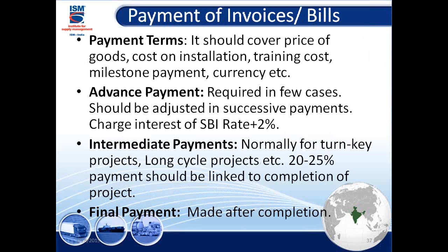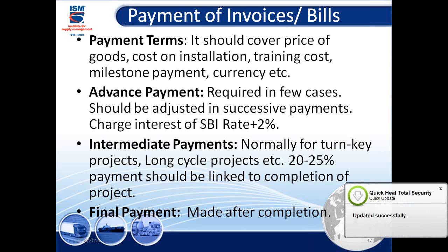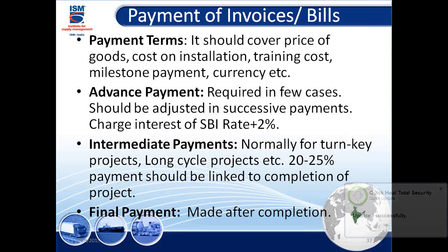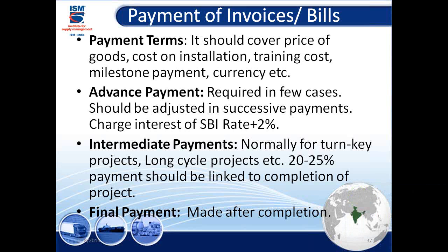Now the payment is the last thing which I want to take up for another 5-10 minutes, and then we could close this session. Now payment terms. Obviously normally everybody says we'll pay you at the end of the job, but in reality it doesn't happen. You have to cover the milestones, the currency, and the training costs. So the payment terms should address all this, and should not be a lump sum cost. So whenever you're getting payment terms, ask the guy to give them in split.